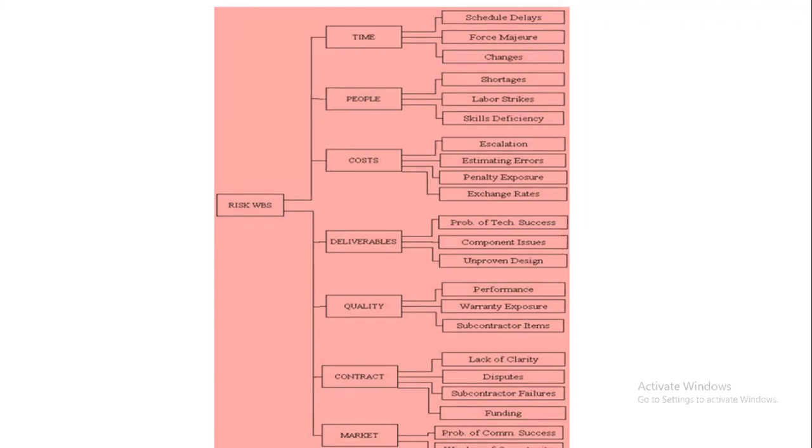So in that case also, if any failure of that subcontractor happens, finally the customer is going to ask the person who has started the business, the person from whom they have bought. They are least bothered about all other things. Whether the subcontractors delivered to you or not does not matter to them at all. The only thing that matters to them is that you have promised to deliver in a certain specific time. You need to do it, right? So that is also one of the important high risk issues.